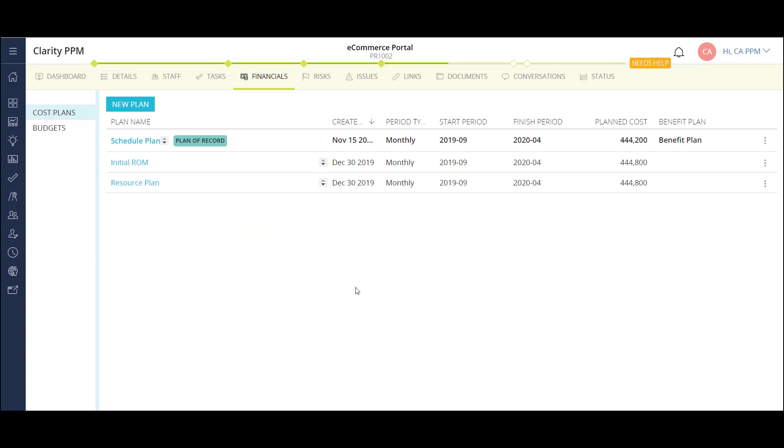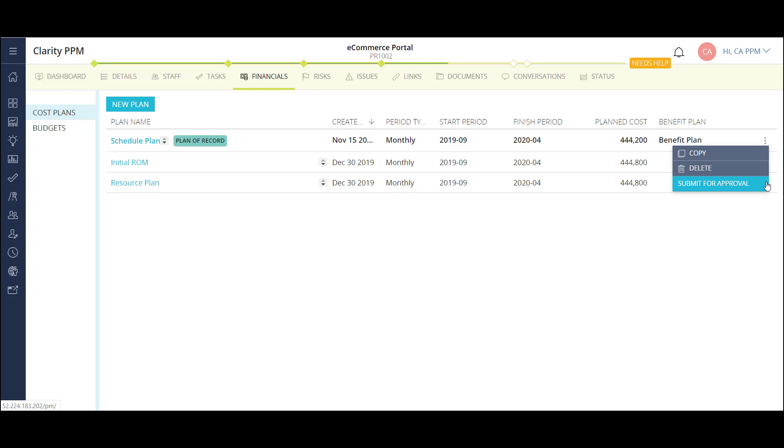I'm able to have multiple cost plans, and Clarity keeps a historical record of each one. Once the cost plan is detailed to the level I need it, it can be submitted to become the budget for my project. The ability to submit a budget is separated from the ability to approve a budget by access rights. We can give those rights to the appropriate users in each organization.